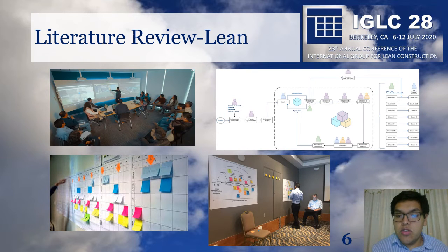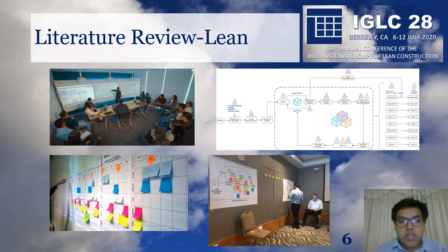Based on the literature review, IPD used lean tools to support this methodology. For example, one of the key tools used in this methodology is pull planning, when people collaborate in a big room, for example, to express the workflow, identify if there are some problems, and collaborate between all the stakeholders, planning a flow to achieve the objectives.